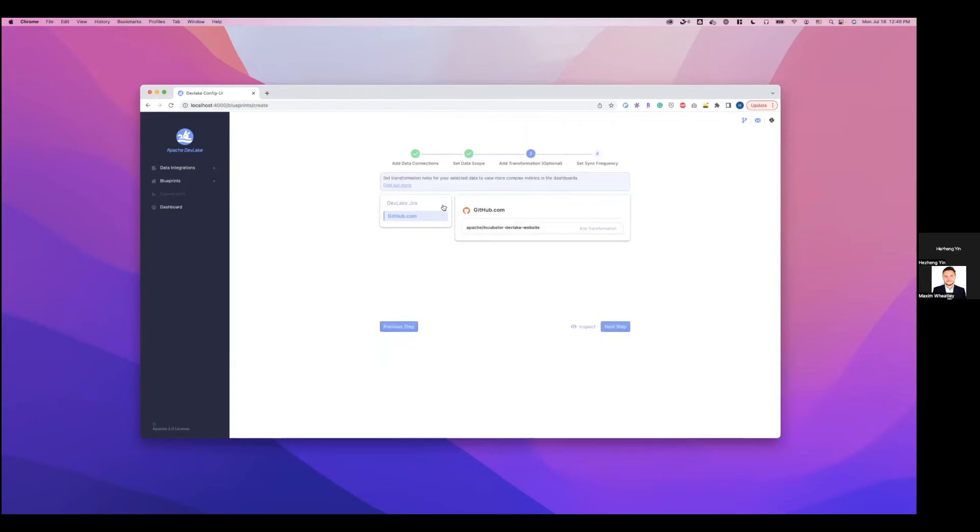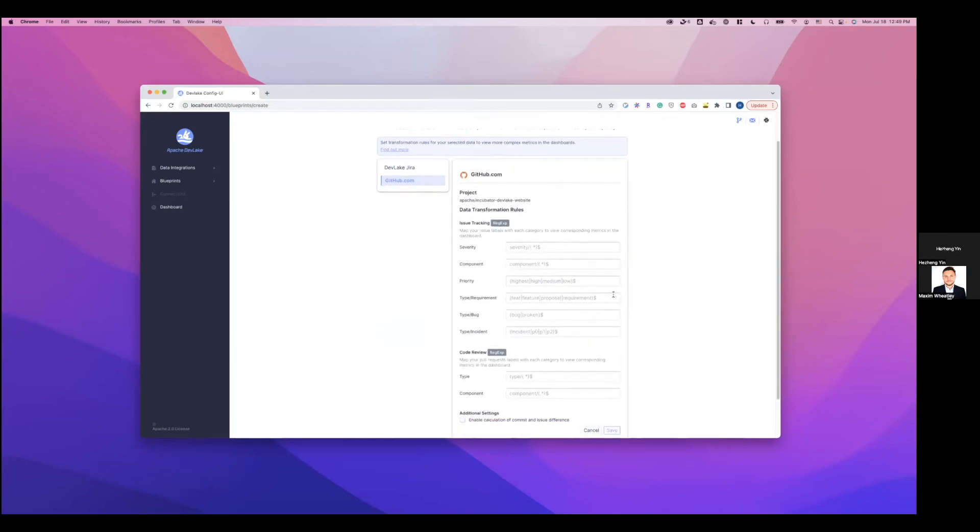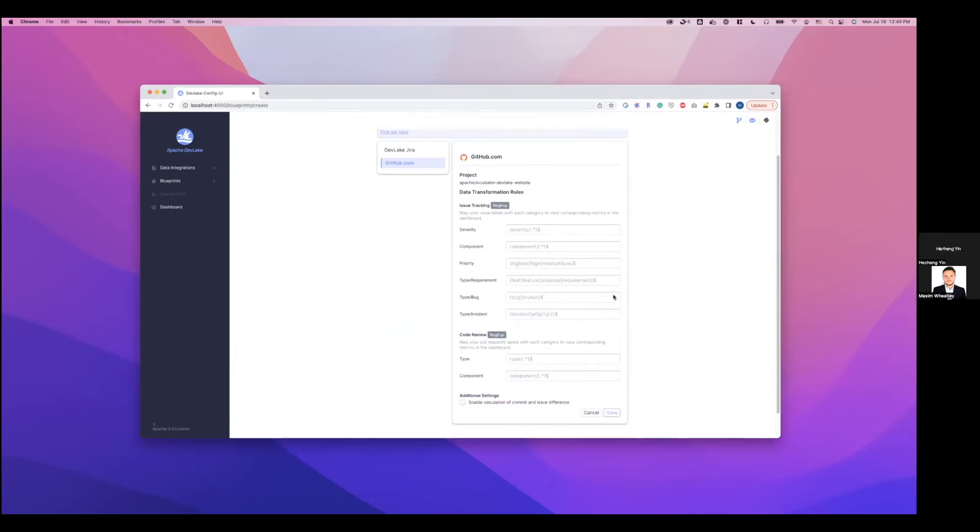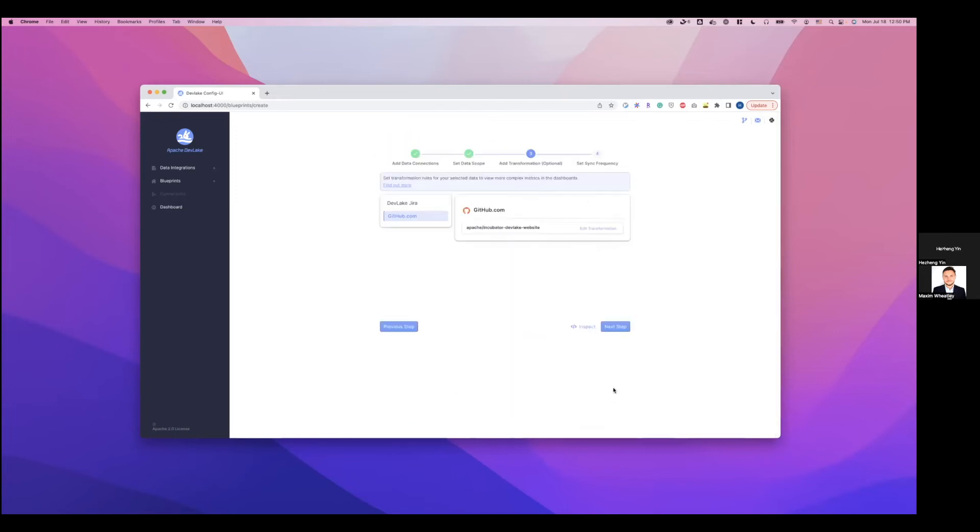And then here, we can define some data transformation rules. For example, for GitHub, we can specify which GitHub issue label corresponds to which type of issues. For example, let me configure issues with label bug. They correspond to type bug. And then save this setting.